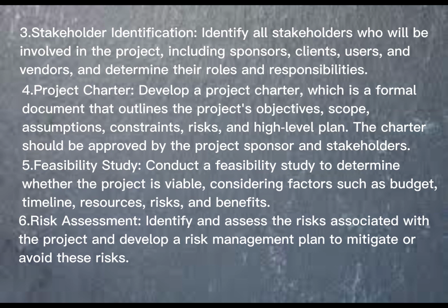3. Stakeholder identification. Identify all stakeholders who will be involved in the project, including sponsors, clients, users, and vendors, and determine their roles and responsibilities. 4. Project charter. Develop a project charter, which is a formal document that outlines the project's objectives, scope, assumptions, constraints, risks, and high-level plan. The charter should be approved by the project sponsor and stakeholders.